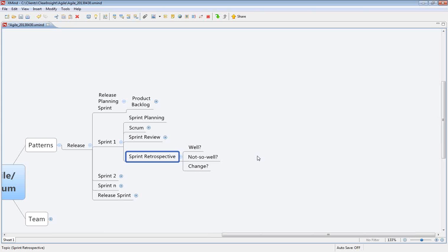Here, we're building into our process that every 2 weeks we take a moment and say what went well, not so well, and what do we want to change. And it could be something as simple as, we're sending too much email. Or, I'm not really sure that these meetings are all that useful. Do we need all these meetings? There's a lot of really simple things that someone suggests as an observation at the time, and it's a small course correction, but over a long period of time, those really add up. So this is why we try to leverage that.